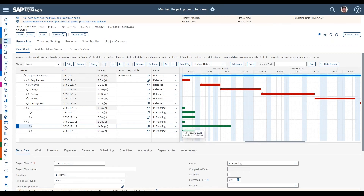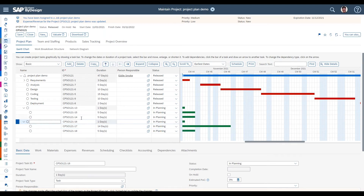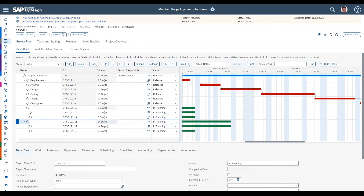The reason the cursor didn't change on one task here is that it's a summary task of the two subtasks below it — its duration is driven by those subtasks. Once you've made your updates, clicking the Schedule button will recalculate and update those summary tasks to reflect the overall duration of their child project tasks.